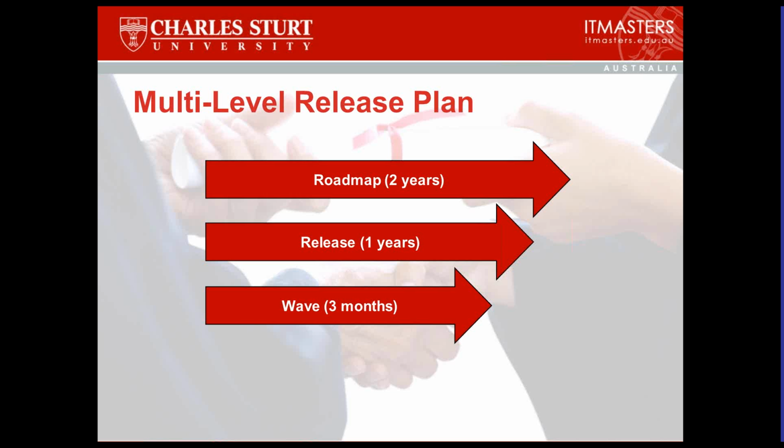So you look at a wave of 3 months. Well, what epics can we get? Well, we can get the customer reporting thing done. Great. Okay. Well, we can get this other thing done. All right. Great. So then we look at the individual user stories and we start planning out the first iteration and what can we fit in that first iteration. But we've already planned loosely what we're going to fit into our wave. Do we plan what's going to happen in the next wave? Not very much. Sometimes not at all.